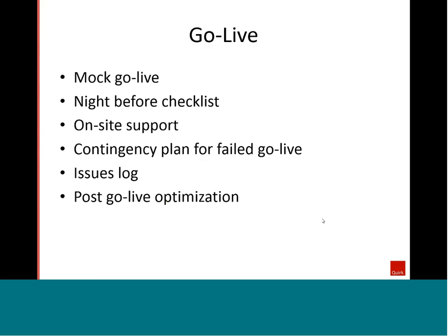For Go Live, even for an upgrade, it's always a good idea to do a mock Go Live a few days before the actual Go Live. And then having a night before checklist is another really useful tool. It allows you to document everything that you need to ensure is in place before Go Live. On-site support, making sure that you have somebody who's clinically well-versed, somebody who's technically well-versed available, so if users start to panic because something isn't going the way it should, you're able to address those concerns on the go.